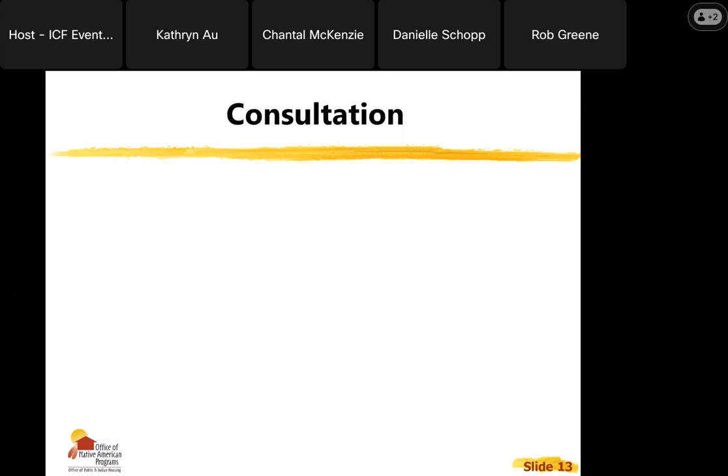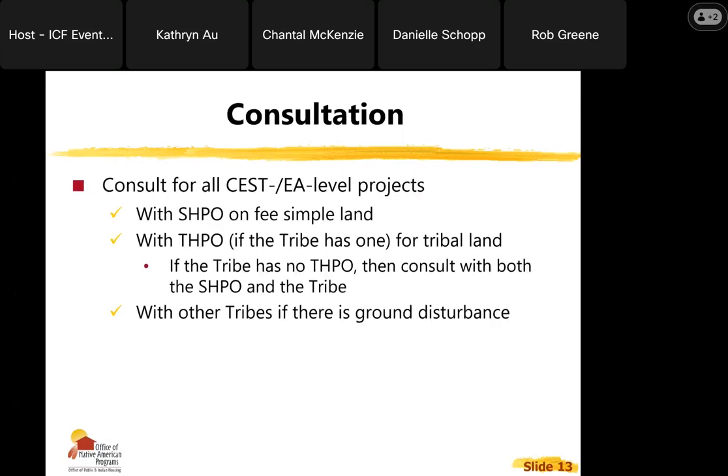For consultation, so who do you consult with and when? Again, you're going to consult for all CEST or EA-level projects. You're going to consult with the State Historic Preservation Officer if your project is on fee simple land. You'll consult with the Tribal Historic Preservation Officer if the tribe has one, if your project is on tribal land. If your project is on tribal land, but your tribe does not have a THPO, or Tribal Historic Preservation Officer, then you consult with both the SHPO and the tribe.